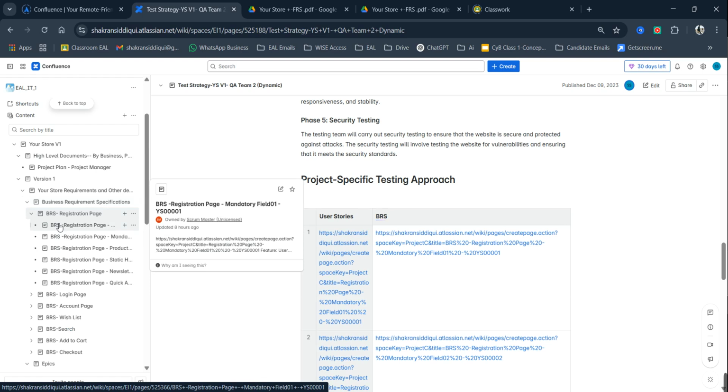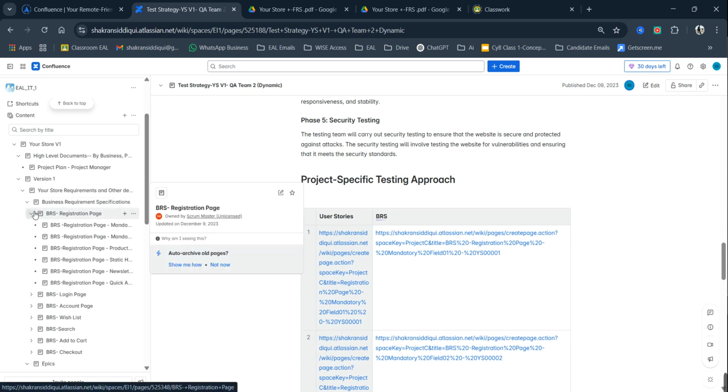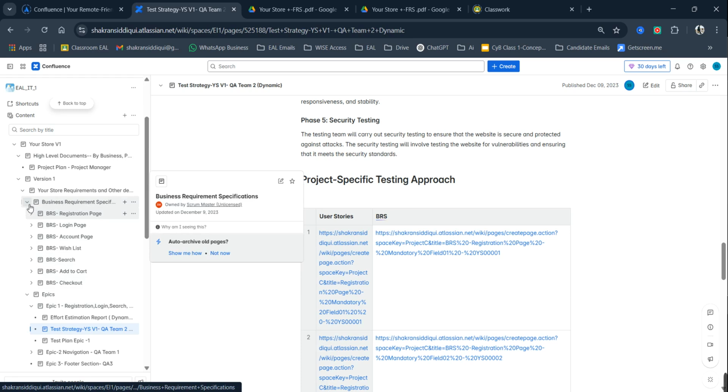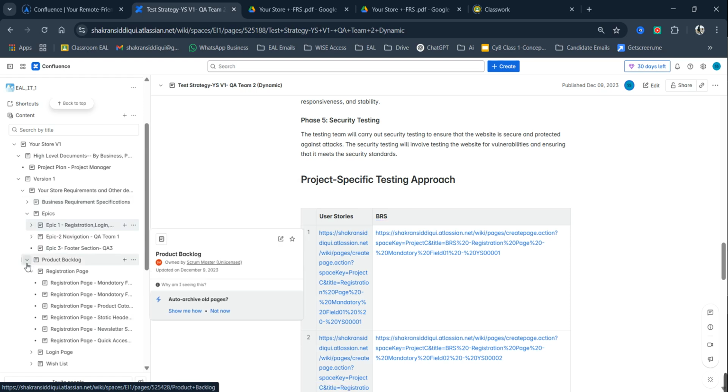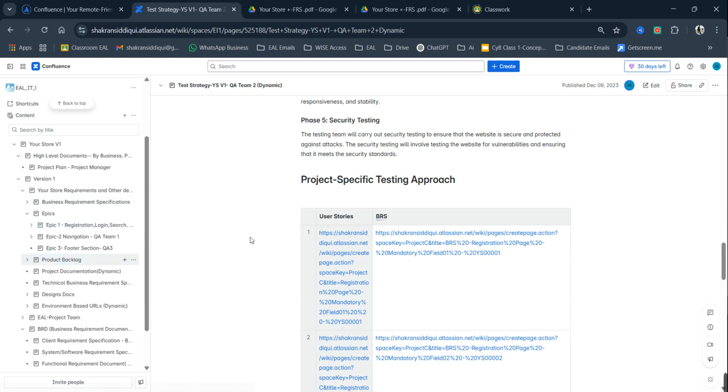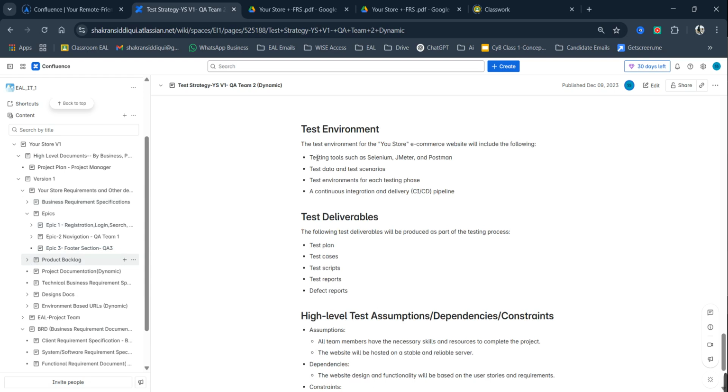By BRS here, we are not actually meaning the whole document with all the user stories prepared. No, we're talking about the 100% complete user stories, including the acceptance criteria, scenario, technical part, everything that I've told you before, with the severity and priority. Okay, so these things are constantly updated here. It is not like it is created once and left like that. No, throughout the refinement sessions, pre-refinement sessions, every time anything needs to be updated, it is updated over here. Okay, it is constantly being updated.